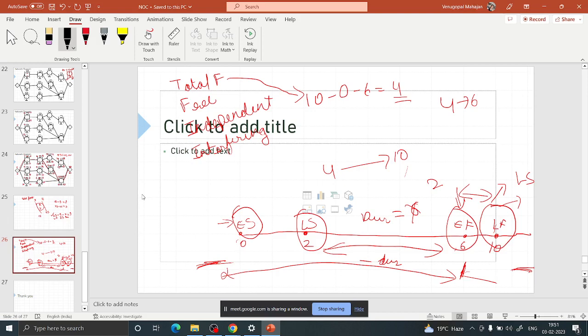Similarly, coming back to the point that early start and early finish we are calculating only on the basis of duration, I mean, early start plus duration is equal to early finish. That happens in critical path method because there is no other logic we are using to calculate the early start and early finish values. But as you have already done PDM, you must have seen that there are cases of interruptible activities where these two values can be different, right?